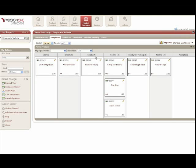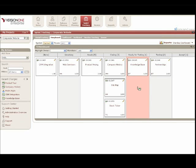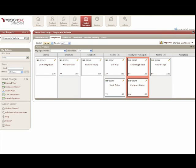We can also see we've got our work-in-progress limit next to each of these status values. Ready is a limit of five, coding three. I wanted to do a quick example of a software developer finishing up 'company history.' As they finish and say everything seems to be working fine, they're going to move it over into ready for testing. As the developer does that, he or she will immediately be notified that they're going to be going over the limit. If you drop it in, you'll still see red — because we're over the limit of one, which we've set up to help us realize when items are backing up.